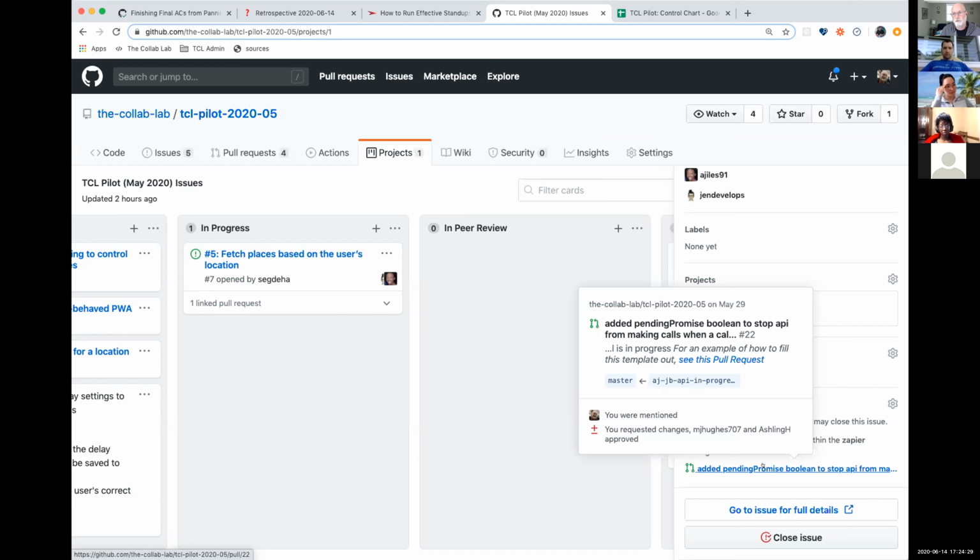That's a really good point. This is maybe something we could talk about in the retro part. If we get down to having most of the things done, but there's one thing that's kind of sticky and we're not sure how to do it, we can close the issue, take that one thing, and move it out into its own issue. Then merge the PR, so it's in a state where it's definitely offering value to the user. It's better than it was. You can pan around and get pins. It's core functionality, and the fact that the center jumps around is an improvement we could make later. So that'd be my recommendation: let's get the panning working, get that into the app, and then make a new issue where we fix that.